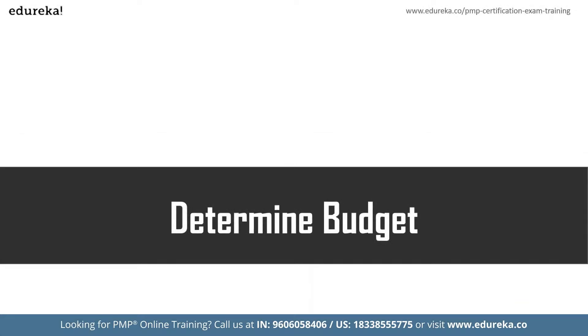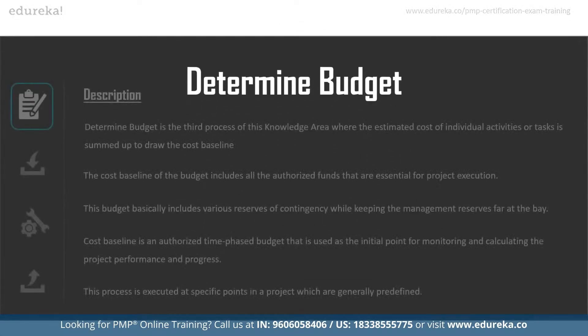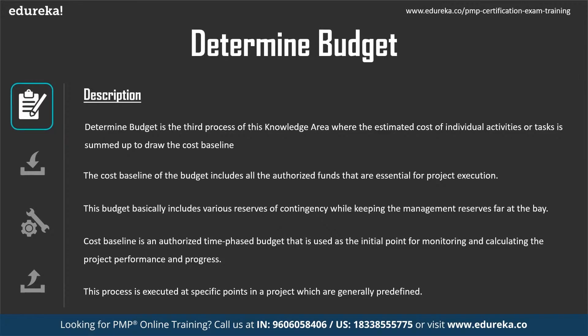The next process is determine budget. Determine budget is the process of aggregating the estimated cost of individual activities or work packages and establishing the authorized cost baseline. It is the third process in the cost management knowledge area. This involves summing up activities and tasks to identify the cost baseline. The cost baseline includes all authorized funds essential for project execution, including contingency reserves related to identified risks.